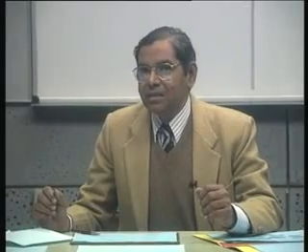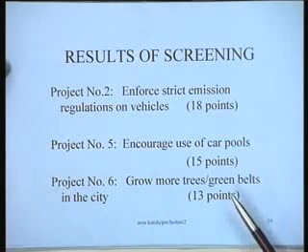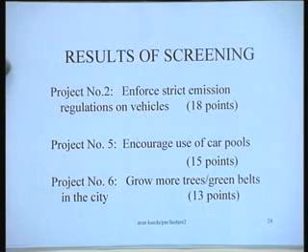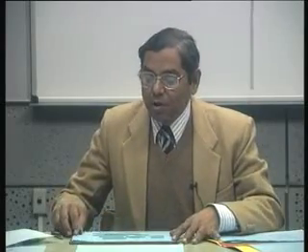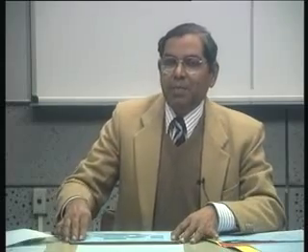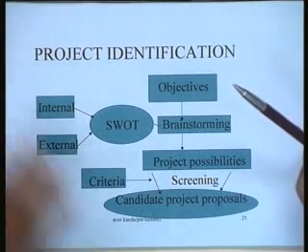And then we subjected them to a screening analysis. We tried to identify what exactly could be done in that front. And we identified the 3 best projects. So these are the ones which are available after screening. Now these would have to be appraised in terms of their financial, technical, market viability, and then we could go ahead. So basically what we have tried to do today is look at the project identification process in a fair amount of detail.